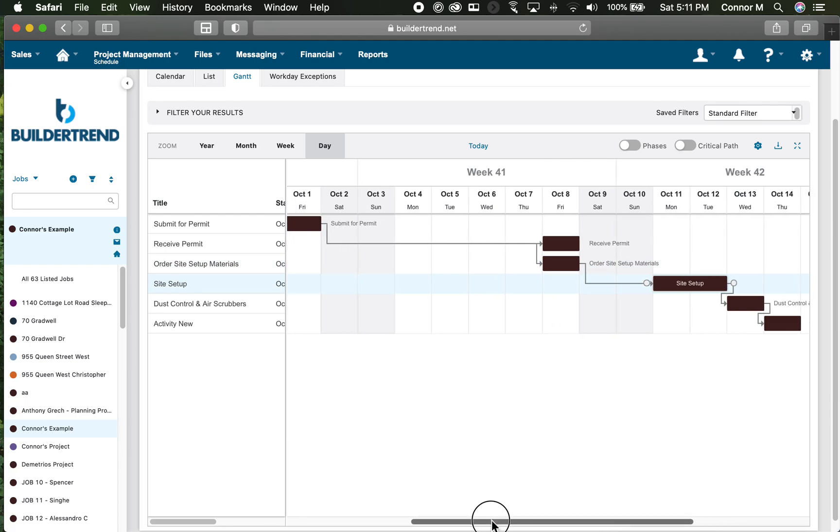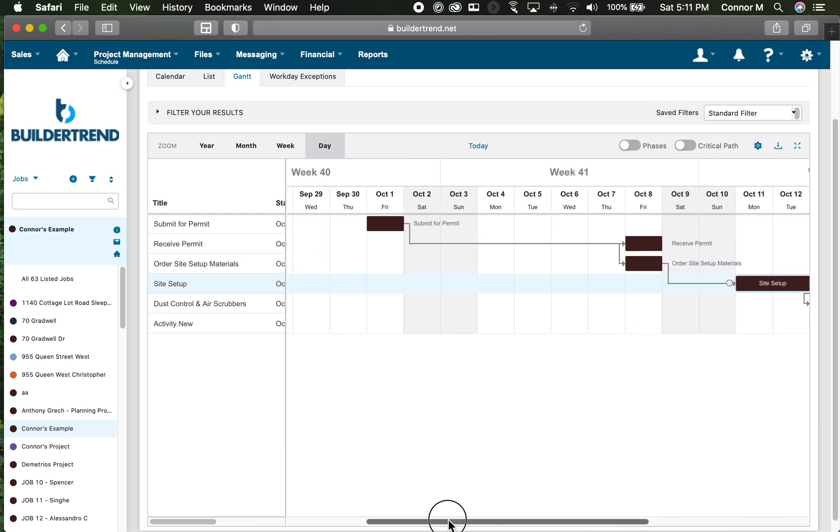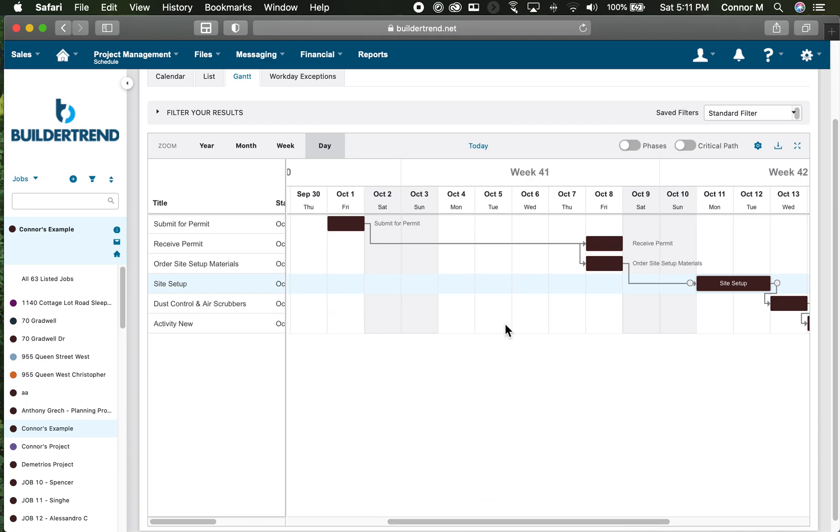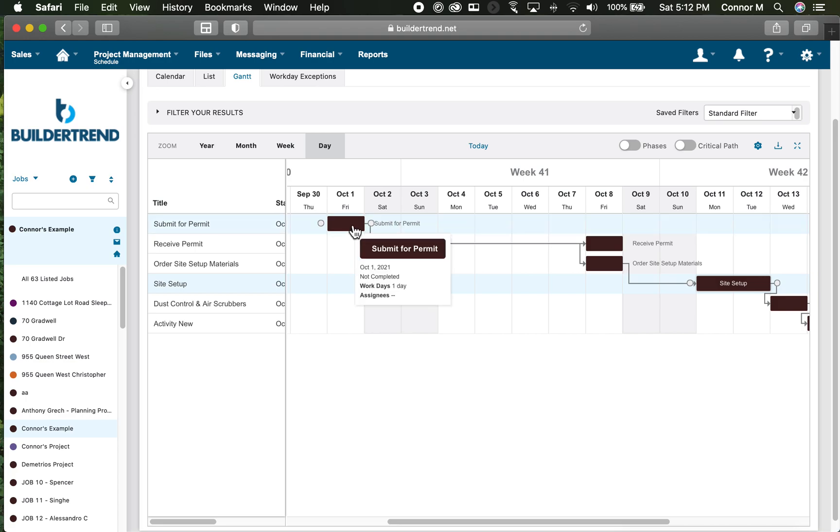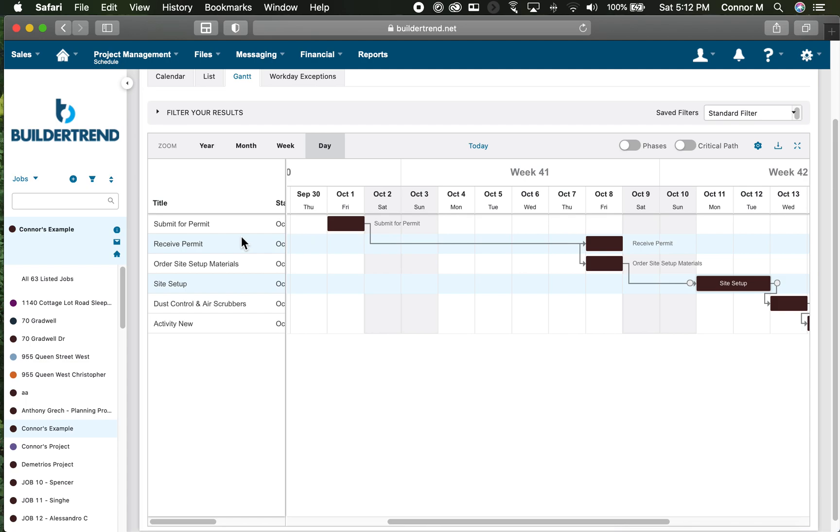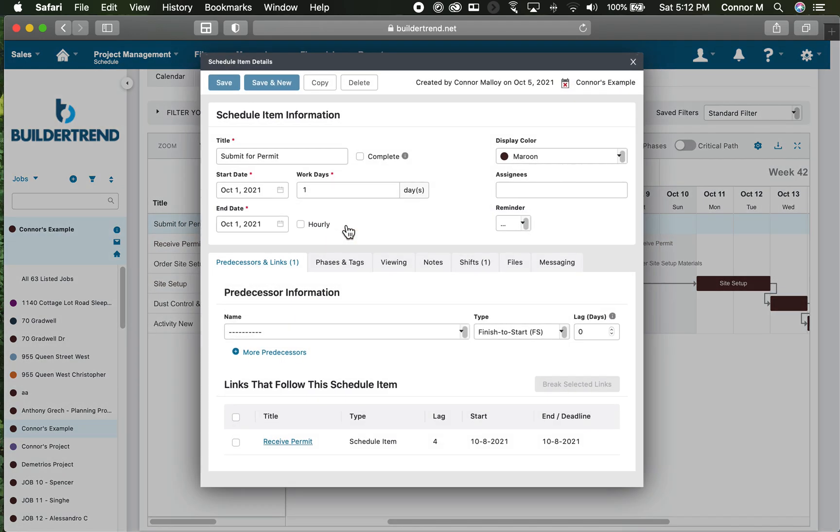The other thing we can do is add phasing. There are ten phases in this BuilderTrend account setup. I might want to know when I have 60, 70, 100 activities what phase they fit into to simplify my calendar view. I can click on an activity like submit for permit.